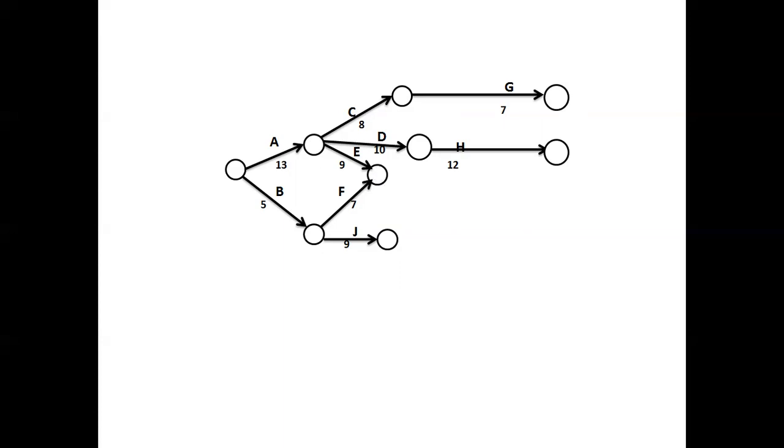So that is why this has been clubbed. So here I and L are controlled by E and F. I hope you are understanding. Then K follows J. So after J, the next activity is K.